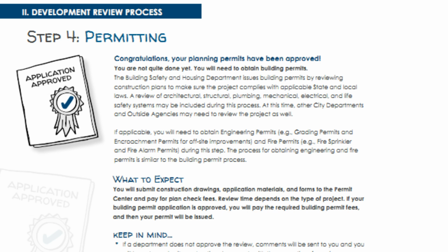Building permit process. Submit building permit application. The permit technician will process the application and let you know your required plan check fees. Pay your fees online or at the permit center. Plan review. Plan reviewers will review your plans and indicate if you need to make any adjustments for building code compliance. Permit approval. Your project coordinator will alert you that your building permits have been approved or need to be resubmitted.